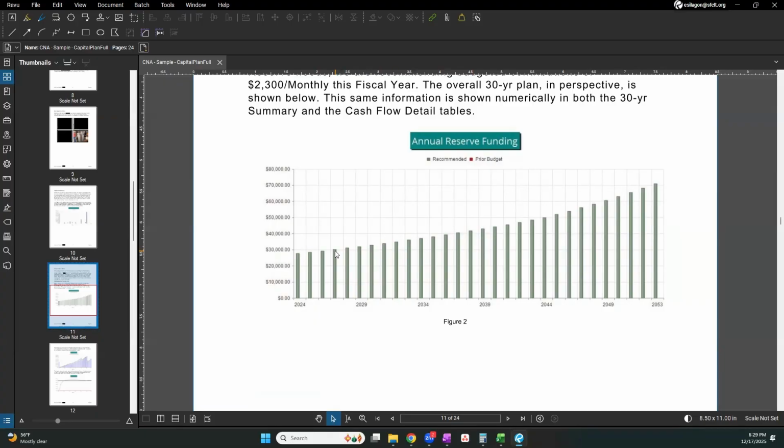And I think it's important to note that because on some of our pro formas when we acquire, the assumption shown is that the replacement reserve contribution is a flat contribution quarterly or annually, and it's not growing at a percentage. So we might talk to Association Reserve about modifying that assumption so that we can see more accurately what's the impact if we're not increasing our contributions year over year.